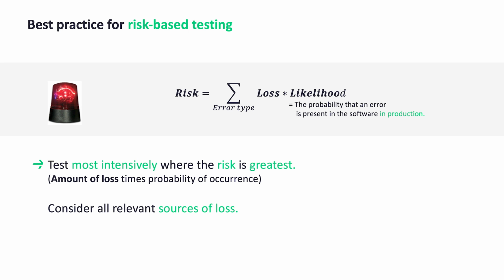As a project manager or client who has to decide on the test budget for a project, the formula means that different projects have different test requirements in order to achieve the same level of risk. For projects with a higher potential for loss, you need to invest more testing effort to reduce the likelihood of a bug going undetected. Above all, in these cases, you will have to invest considerably more test documentation effort in order to be able to draw the conclusion that a green test suite means a low probability of errors.